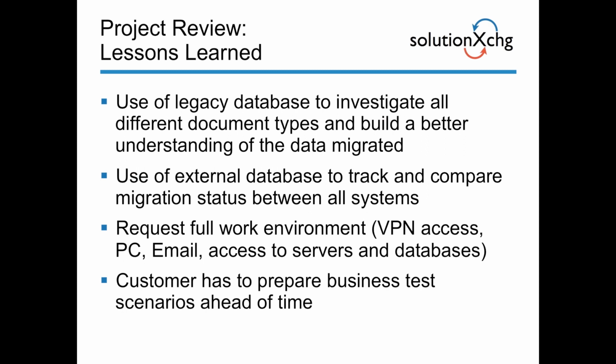So some of the lessons learned is that we plan on using the legacy archiving database to investigate different document types and build a better understanding of the data migrated. It's important, especially if you change viewing tools in the process, to understand what type of documents you have stored in your archive to make sure that all viewing capability is seamlessly transitioned from your legacy system to your future system. That doesn't apply to all customers.